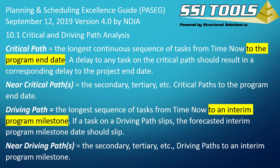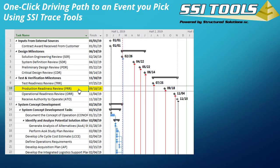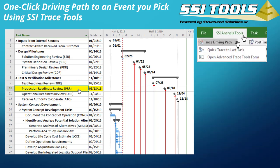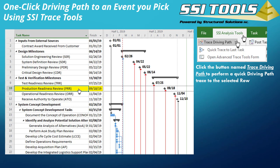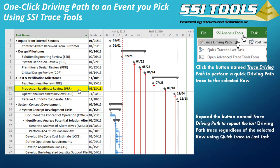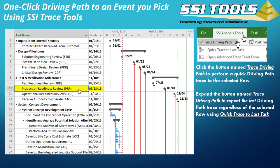I have a few more presentation slides showing how this is done using SSI Tools, then I'll demonstrate SSI Tools using an example schedule. Here's an example schedule and I have selected row 10 — it's not the end of the project, rather it's an interim milestone named Production Readiness Review. I still want to see why it finishes on September 18th, and SSI Tools will show that analysis with just one click. With any row selected in Microsoft Project, click the button named Trace Driving Path below SSI Analysis Tools to perform a quick driving path analysis to the selected task or milestone.